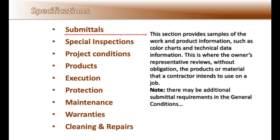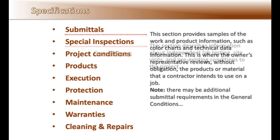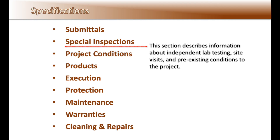The submittals section provides samples of the work and product information, such as color charts and technical data. This is where the owner's representative reviews, without obligation, the products or materials that the contractor intends to use on the job. Note there may be additional submittal requirements in the general conditions, so don't forget to review them. The special inspections section describes information about independent lab testing, site visits, and pre-existing conditions to the project.